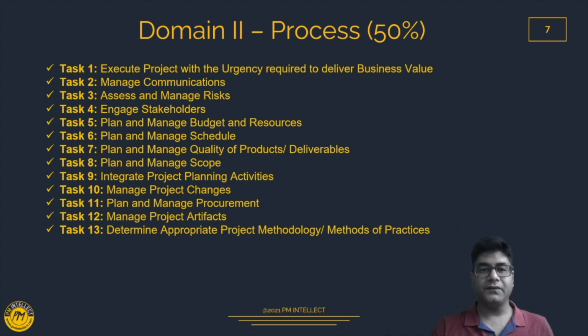Same way, in case of a project with fixed requirements, it is not good if we are going to go with the agile mode of working. In case we go that way, there will be multiple changes and unnecessary rework. So based on the project, we need to determine at the start of the project which methodology we are going to use, and accordingly we are going to implement it.